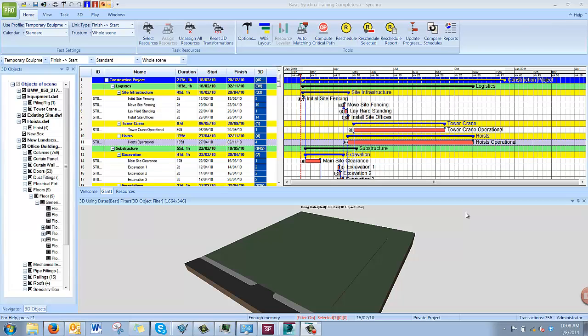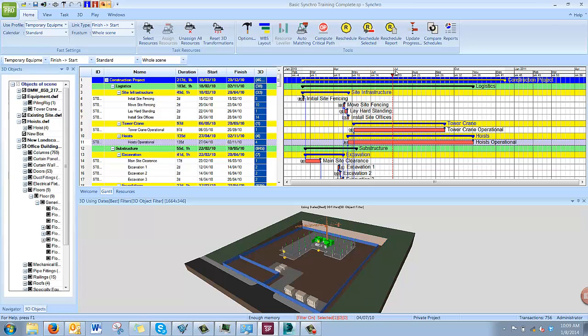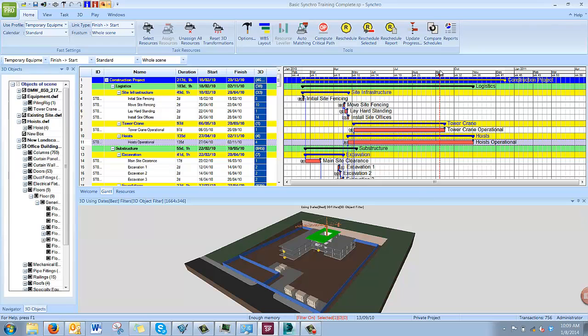Before you export, link all of your objects to the tasks so that the construction sequence is visible as you would like it as you move your focus time through the project. You do not need to have an animation created in the animation editor in Synchro because the export to FBX simply exports the sequence without saving any camera angles or key frames. It simply shows the progression of the project over time using the links between your model objects and your tasks.